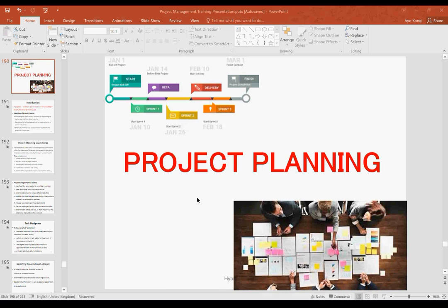After we've put all of this together, we will now all agree that yes, we've all agreed that these are the activities that need to be done. We've all agreed that this is the way they should follow. We've agreed that these are the days that each of the activities will take. We've agreed that these are the resources we need. All right, let us now baseline this plan. So while we're baselining, the plan now becomes what we need to be measuring performance against.